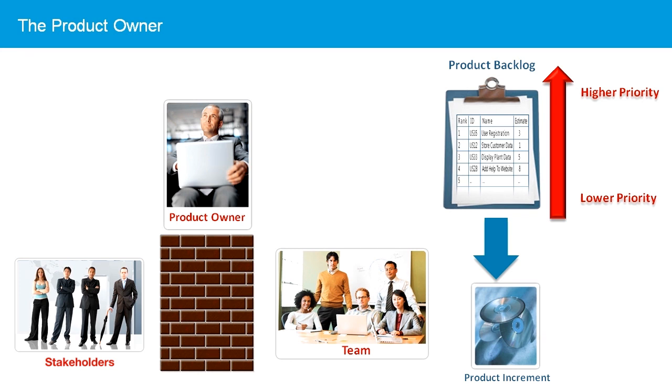The product owner must help the team understand requirements, while trying to understand the technical process and the difficulties of the task the team works. The product owner determines what goes into the product, but the team decides how the work is done and the level of effort it will entail. The product owner cannot overrule the team's estimates for the tasks accepted in the sprint. Additionally, the product owner should not push the team to take on more work than it believes it can accomplish in the sprint, and must not add additional work to the sprint once it is in progress.